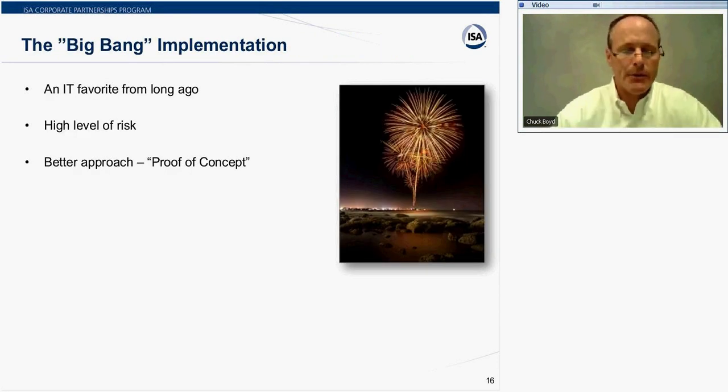The Big Bang implementation. This is where we switch from using the old system to using the new system on a fixed, predefined date, on a single date. These are very common in IT projects from years ago. And since IT is likely to own this project, it is very likely that we may see this approach. It is extremely risky.